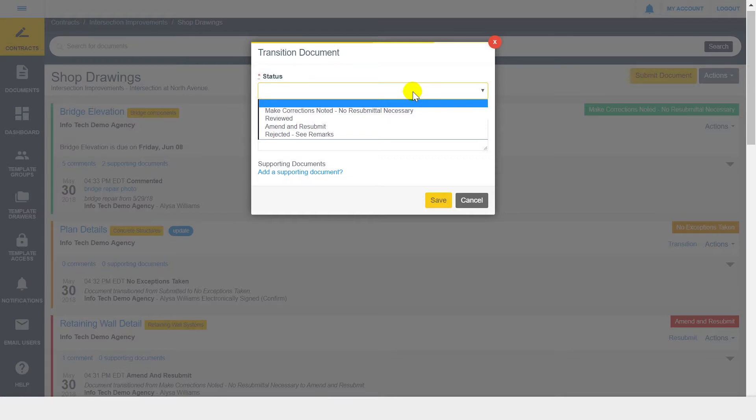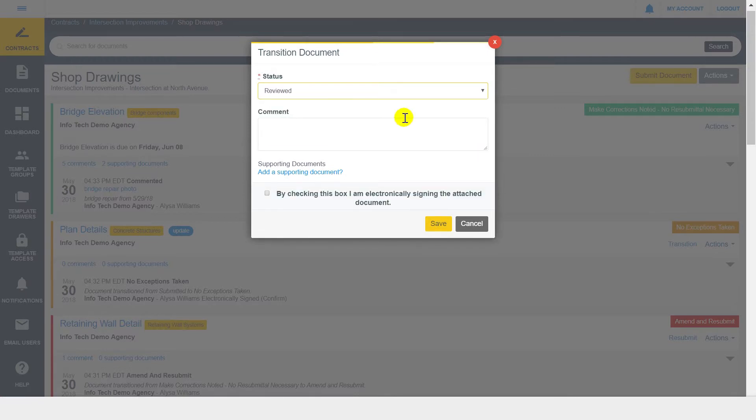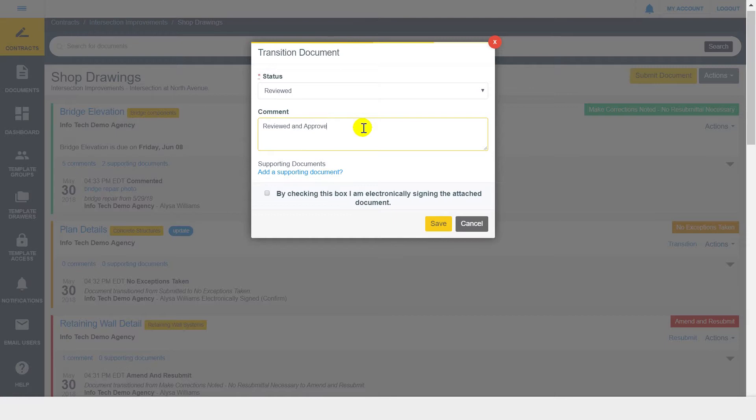Select the workflow step you'd like to advance this document to. During transition, you optionally have the ability to add comments or supporting documents. As an example, if signing a change order, you could add a photo or comment to justify the need for the change order.